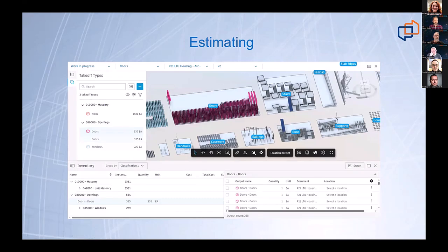Estimating, certainly not on a full-blown "we're going to get the estimate and the cost of the building from the model" basis, but streamlining things in terms of quantity takeoff, in terms of counting elements, and then building Excel files and building what they need off of that to do the cost estimation. It's going to help in bid management communication. It's going to help in accuracy and procurement.